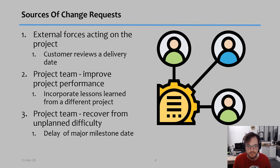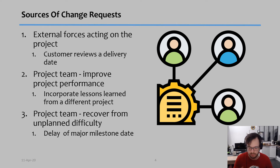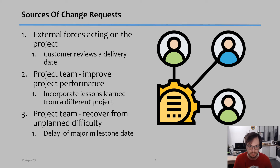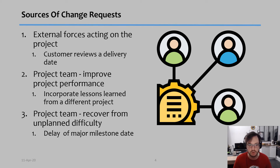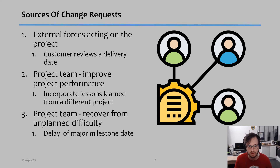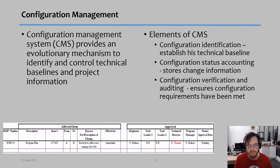So how can changes be requested? There are three major sources of change requests. First, external forces acting on the project — for example, a customer asking for new requests, or a manager asking you to do something extra or to change something. The other two sources come from the team itself: the project team asks for a change either to improve performance, or to recover from an unplanned difficulty.